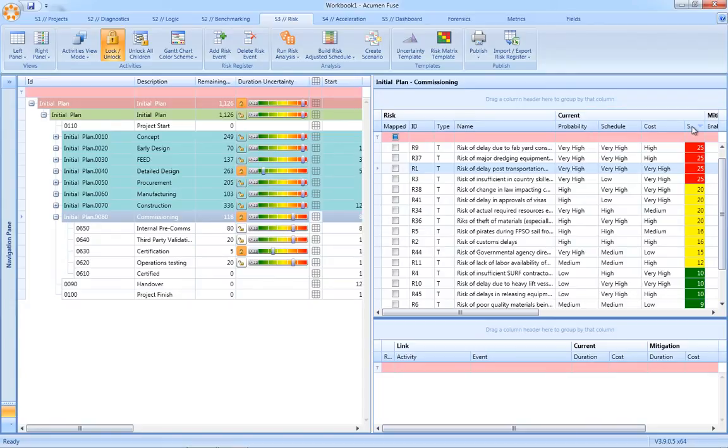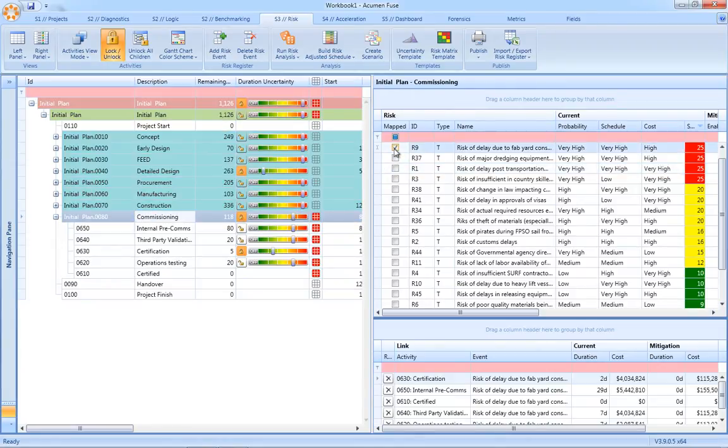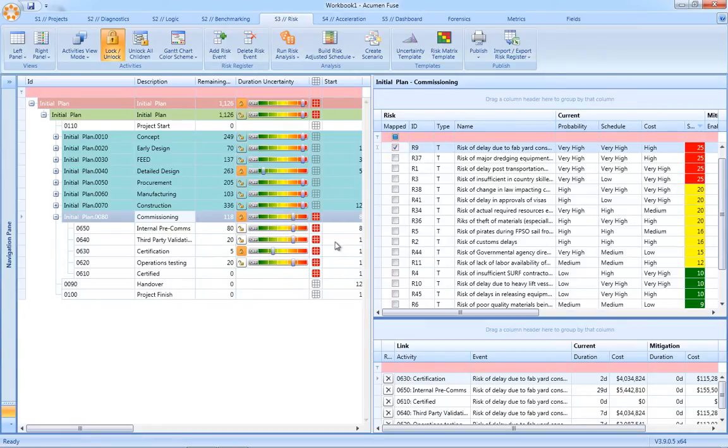In terms of risk mapping, you simply select the activity or the groups of activities, and then the corresponding risk event and Acumen Risk will automatically map that single risk to, in this case, multiple activities within the commissioning WBS.